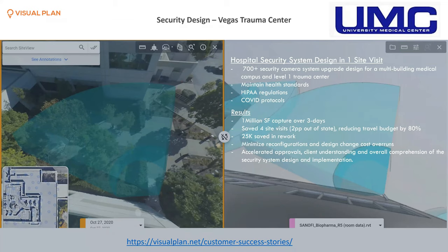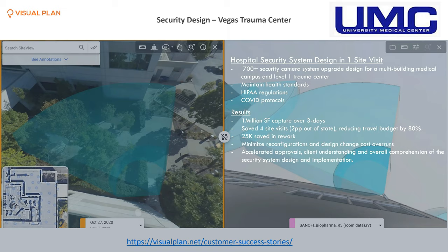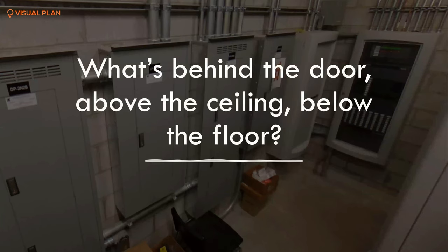Another interesting example was a recent project with security consultant Butchco Inc., where the UMC Universal Medical Center in Las Vegas was scanned — about a million square feet across multiple buildings. The process was focused on where cameras, access control, and certain items were going to be located. We saw a reduction from four budgeted trips down to just one, with numerous opportunities to save on rework and improve collaboration. There were also COVID-related concerns about getting access to those facilities during that time.